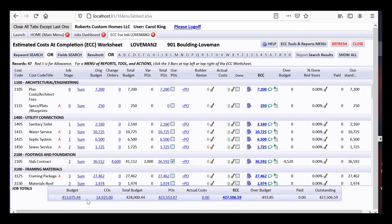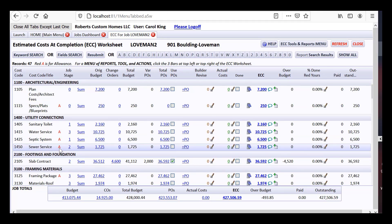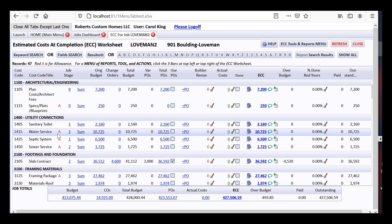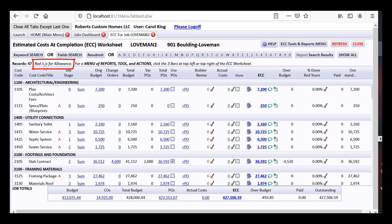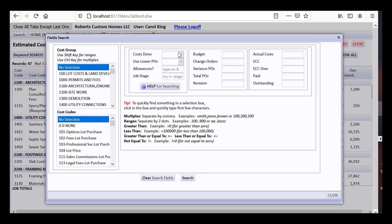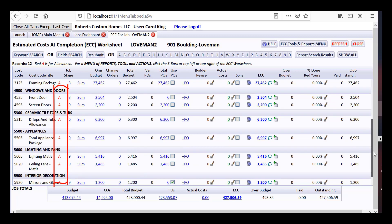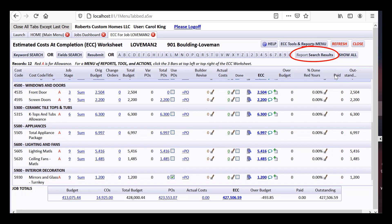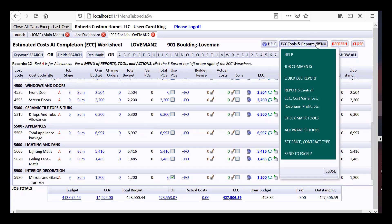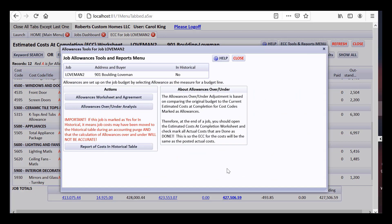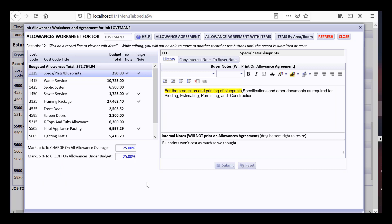Allowances were discussed when preparing the budget worksheet — you can mark certain items with a measure of 'Allowance.' At the top of the ECC worksheet, a red 'A' indicates allowance items. Doing a field search for allowances (type 'A' in the allowances field) shows all the cost centers marked as allowances on the budget. You can print a list of those as a results report. Under ECC Tools, the allowance worksheet and agreement let you set, for example, a 25% markup to charge on allowance overages, and credit 25% if buyers go under their allowances.